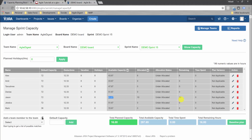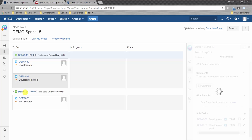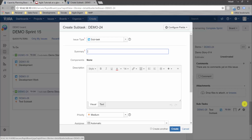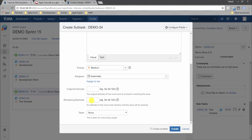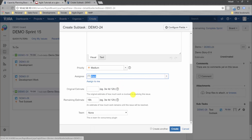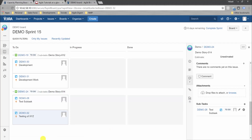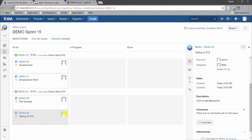Now the capacity view shows 10 hours allocated and 10 hours remaining out of Jason's total 43.67 hours capacity. Next, we create a task for Mark, who has 15.67 hours of available capacity. We create a subtask called 'Testing for XYZ', set remaining estimate to 16 hours, assign it to Mark, and click Create.